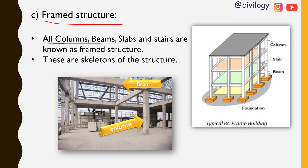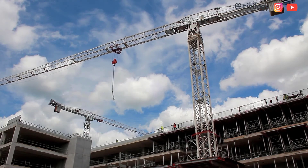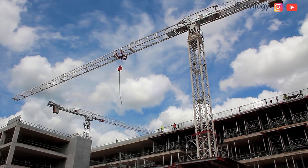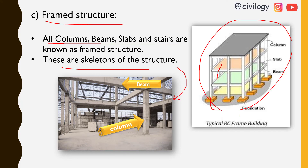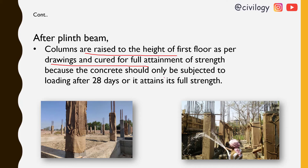In the framed structure stage, all columns, beams, slabs, and stairs are known as the framed structure — these are the skeleton of the structure. In the picture you can see beams, columns, slabs, and footings. After the plinth beams, columns are raised to the height of the first floor as per drawings and cured for full strength.